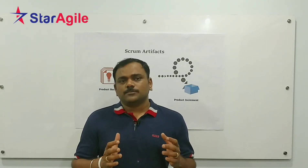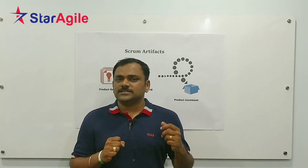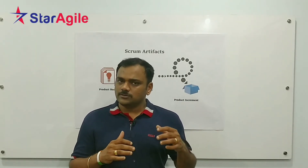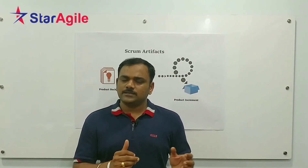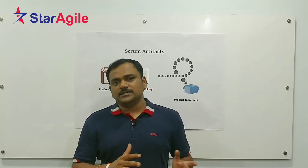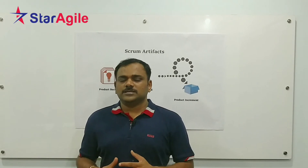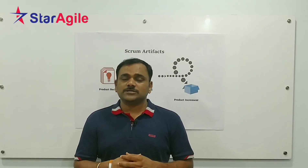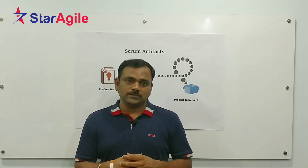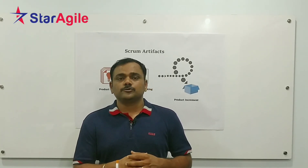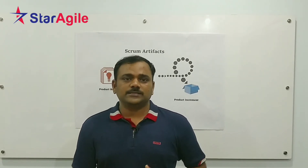Product Increment is not just what the team is working on in the current sprint, but the integrated product that the team has developed so far across the entire project — put together — should be meeting the Definition of Done and should be potentially shippable.